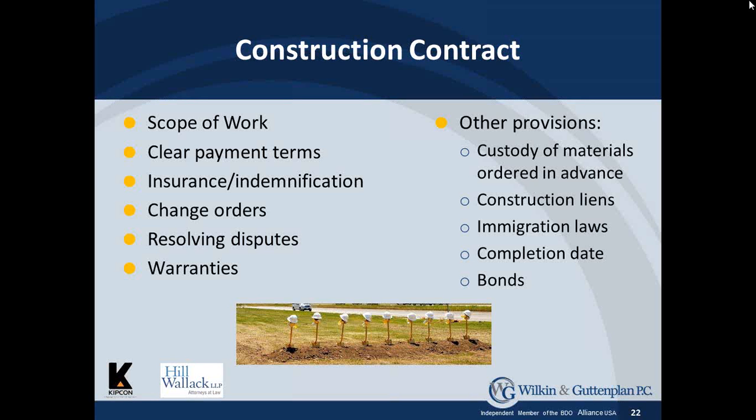Warranties are also important. Will you be getting a manufacturer's warranty? And if so, is this contractor qualified to obtain one? And what is the proper process of obtaining it? It's nice to say in the contract that there will be a warranty, but you have to know how to trigger the warranty and how to make sure that the manufacturer will back it.